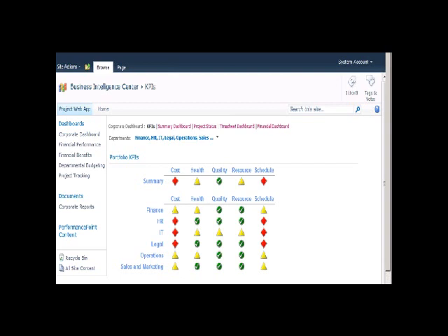And if it's red, that doesn't mean all the projects below it are red, right? So this is where we start getting into the validity of all the inputs, right? Are the project managers keeping things up to date? A common indicator would be one that says a project wasn't baselined, or another example is if the data hasn't been updated for the past 2 weeks or a month or whatever the tolerance levels are for how fresh the data has to be in order to make it credible. Hopefully the last week, maybe.